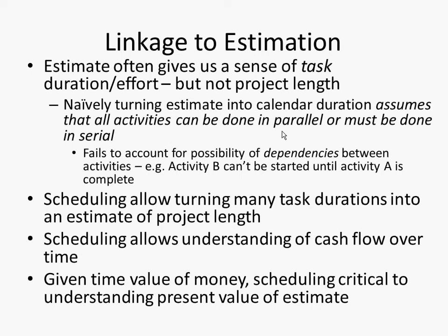For example, until the build server is set up, you're not going to be able to install the coverage testing framework, or the issue tracking system. Until the test infrastructure is set up, you're not going to be able to perform tests. There are these dependencies. You can't do A before B.